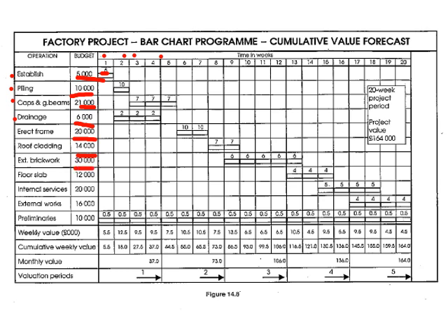So you can very easily get to a point where you plot your budget, and then you can see what your expenditure would be on that budget over the course of the project. So your site establishment will be a week, so in that week your expenditure will be 5.